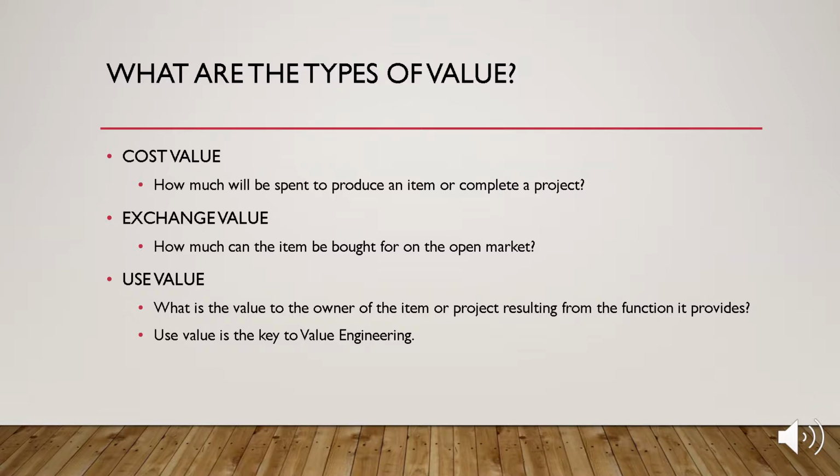And that brings me to the types of value. First, cost value. How much will be spent to produce the item or complete the project? Exchange value. How much can the item be bought for on the open market? What if we just paid somebody else to do the project or produce the product? Use value. What is the value to the owner of the item or the project resulting from the function it provides? What is the value of a bridge to society, to the local community?